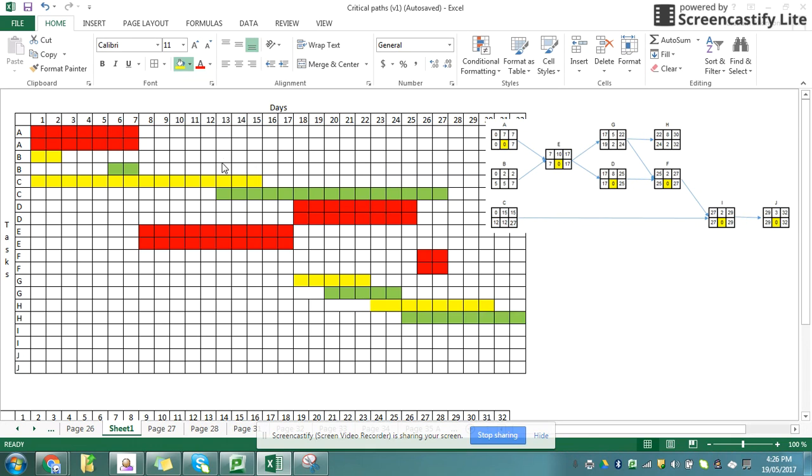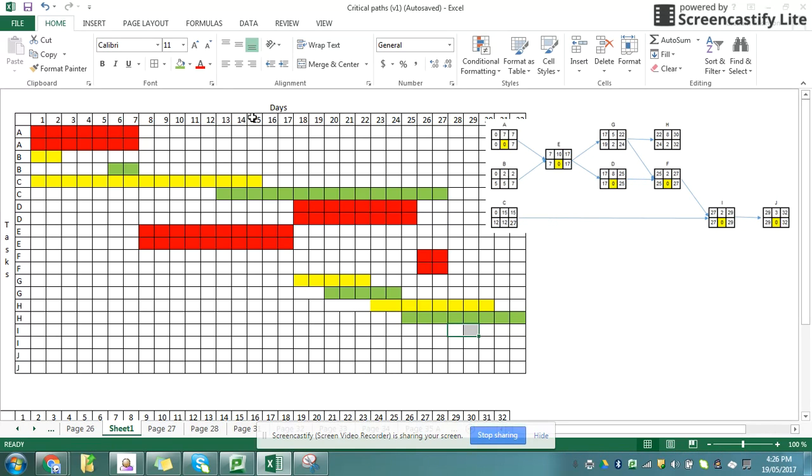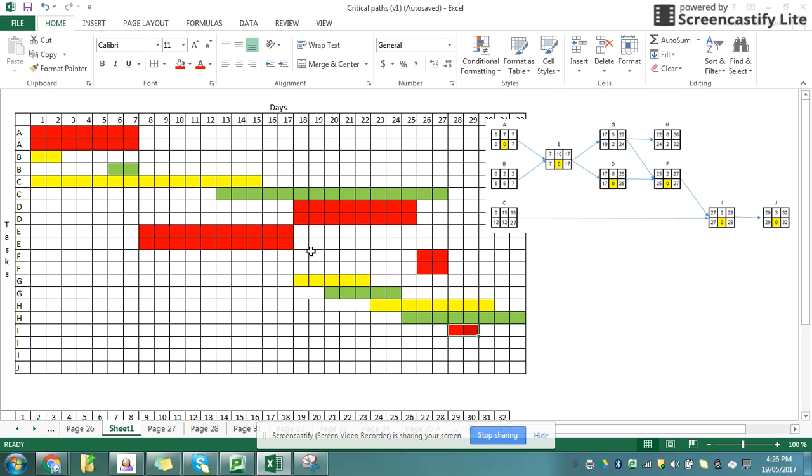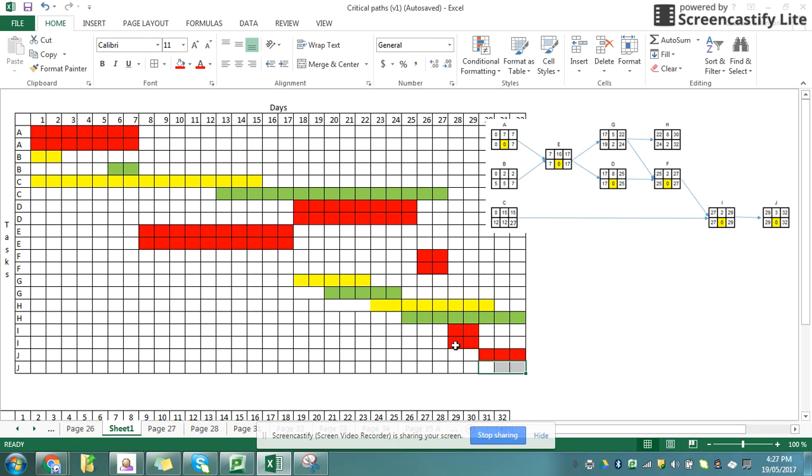Notice how all my lines have to be the same length. Task I starts at 27 and finishes at 29. Again, that's a critical path, so I'm going to do it twice. And task J starts at 29 and finishes at 32. So I have successfully filled in my Gantt chart.